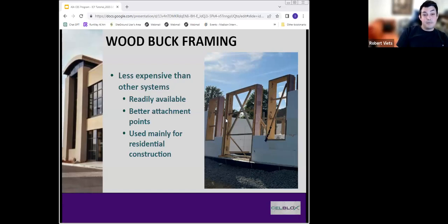Doesn't cost much. You can just change it. Whereas with the vinyl bucks or metal bucks, that could delay your whole project while you order new bucks from the factory. So I like to go with wood.